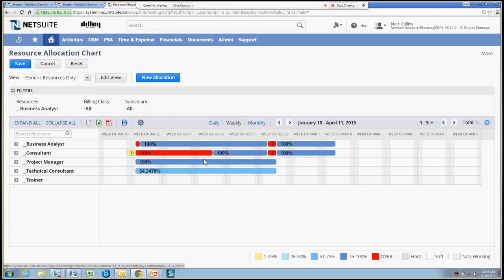And with this, I can go ahead and see, am I going to have any bottlenecks in the future? Right here I see that I've got a red 110%, meaning that I'm going to need more than one resource to be able to satisfy the need of this time frame for the consultant role. So that will help me schedule out the right people in the future on these different projects.